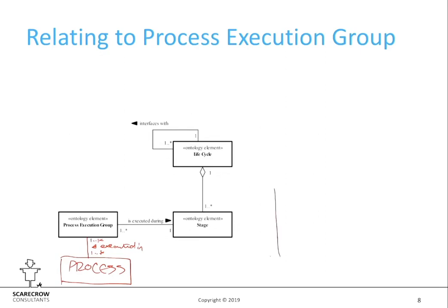So for example, if you graph, say, the requirements process, you've got effort vertically, and you've got the stage, so essentially you've got time on the horizontal axis, but split into various stages. Your requirements effort, if you're doing your project properly, should tail off like that. Most of your work's done up front, but it tails off later on.